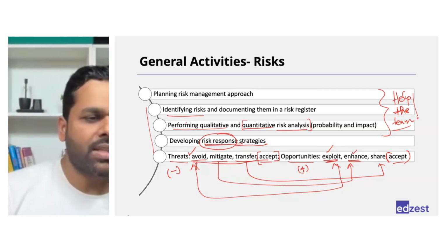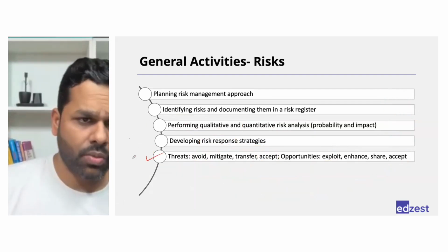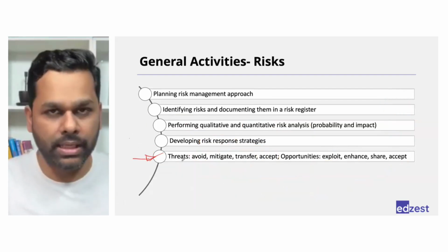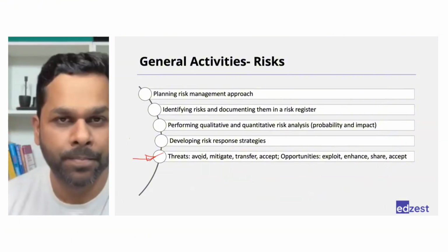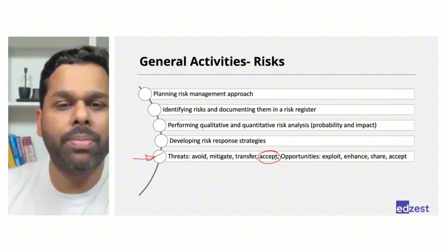Right? So these are the responses you plan for the risks. One question for sure will be there in the exam. Yes, Neha, please. Your question. When you say accept the risk, then that time you don't need to put the solution for that in the plan, right? Because you said that when it will happen, we can deal with that. Correct. Correct. Okay, thanks.